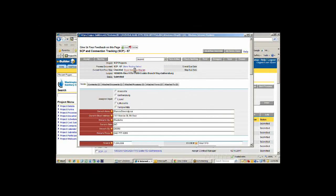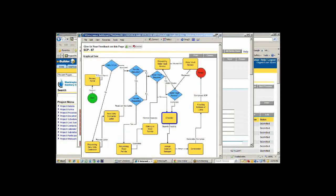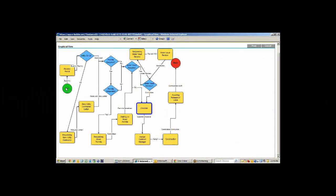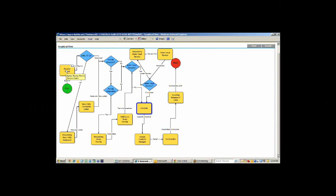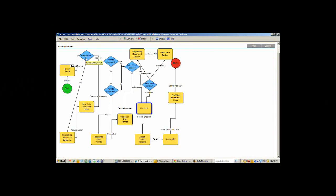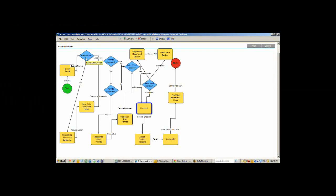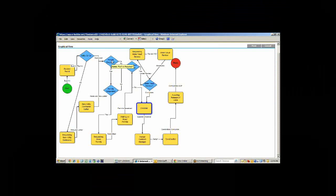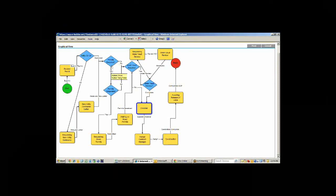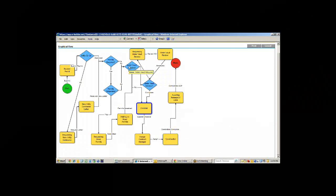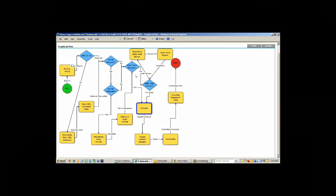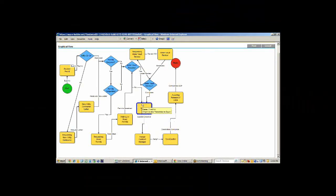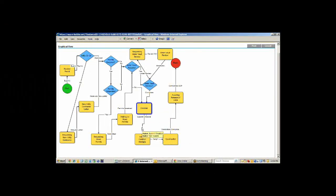If I look at the workflow, this is what our workflow looks like for this particular process. We start here by filling out that basic information. It's reviewed here to determine what permits are required. Then we go through a bunch of checks. Do we have a utility contractor? Yes. Is it approved? Yes. Then we go to the permits. What permits are required? We need a road permit and a tree permit. Are they included? Yes. Then we can go to meter vaults. Do we need a meter vault on this installation? No. So if it's no, we just go down here to the checklist. At any time, I can see in the process where we are by this blue circle around the particular step that we're in. This shows me that in the checklist step, the next is going to be go to construction.